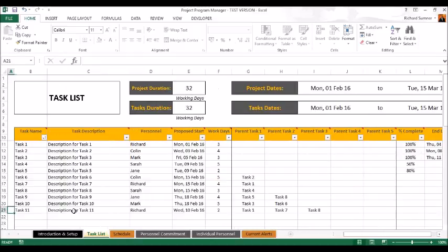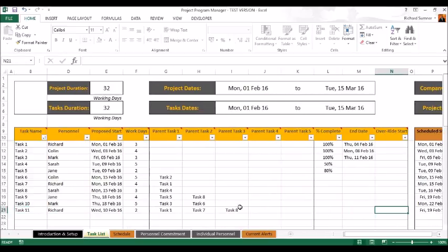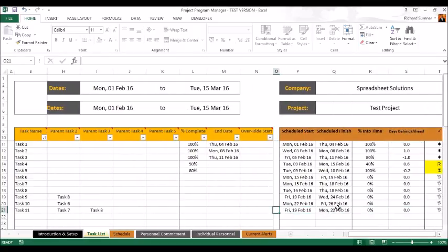It doesn't matter which date you've put in, it will take the next actual start date where it can, because it needs to be started after task 8. But let's just say, for argument's sake, you get to the 17th of Feb and you realize actually we can start it now because it didn't have to finish task 8, and we're going to override all dates and start on the 17th of Feb. In this override start date, we can put in the 17th of Feb, and that will change that start date to a definite date on the 17th. So you've got the override option. Otherwise it'll track the other dates and put in the date when it can actually start.